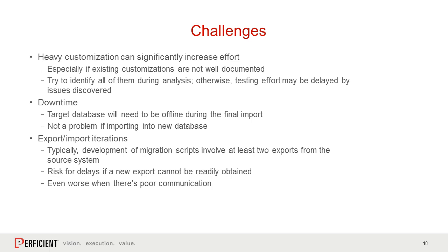Downtime is a pretty big challenge for a lot of clients. I mean, depending on the size of your data, it could take a few hours, it could take a few days to actually migrate the data. So you need to plan out the downtime accordingly. Does it need to happen during a weekend? Can it happen during the week? What are the considerations there? But usually I wouldn't plan for less than a day. You're usually going to need at least 1 day.